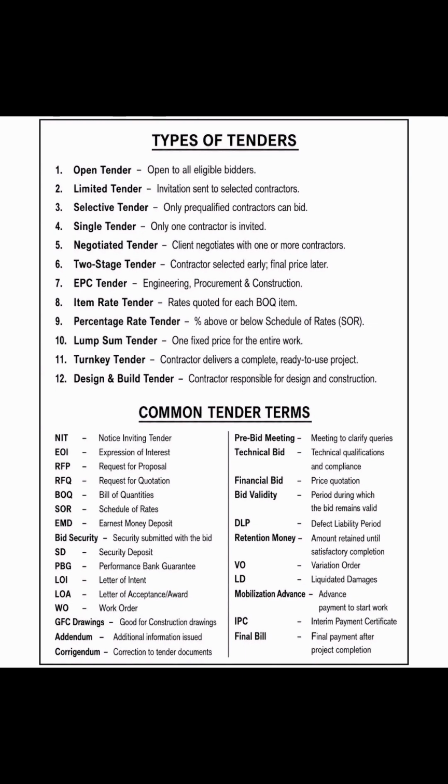Then we have final bill. So final payment after project completion. Yes, if the said tender is in percentages, maybe at the first initial stage they are going to pay you 20%. Then maybe when you go midway, they pay you maybe 40%. Right, that is 20, 40, that is 60%. Then on job completion, they pay you the remaining 40%, that is 20, 40, 40. So this final bill is the final payment after project completion. So after the completion of the project, you are paid that particular 40%.